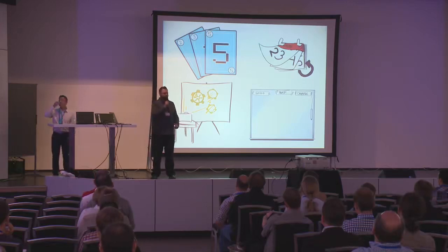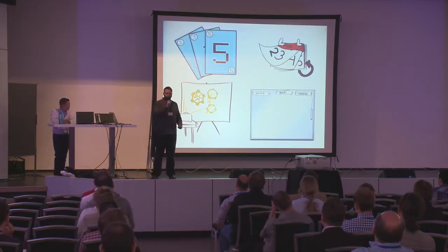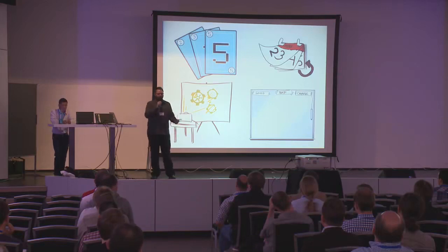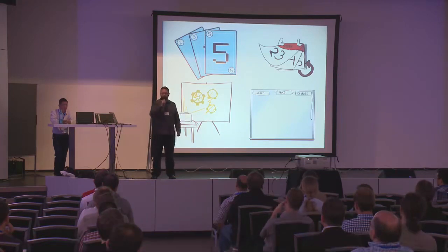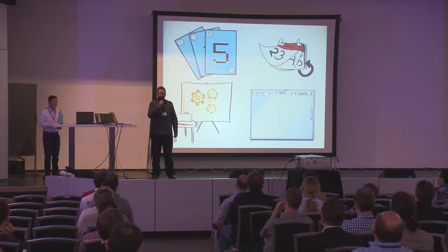This is at the start of every sprint or iteration, and this is the point where the development team meets with representatives about the product, and they choose what they're going to work on during that sprint. And it's important to note that the development team chooses how much work gets brought in.